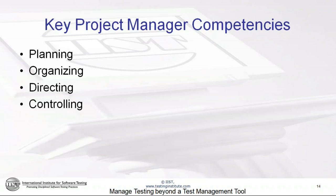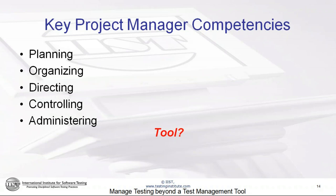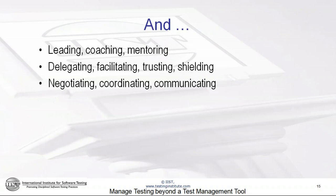If you've studied project management, you've probably seen key project manager competencies: planning, organizing, directing, and controlling. There's a fifth competency that tends to be overlooked, and that's administering — doing the work of managing the project. One of the first places that projects fail is that project managers don't give themselves time to do the work of managing the project. When the project isn't managed, the planning, organizing, directing, and controlling fall down. Tools can capture the results of planning and organizing and controlling and administering to some extent, but the tool does not do the planning or organizing or directing or controlling or administering.